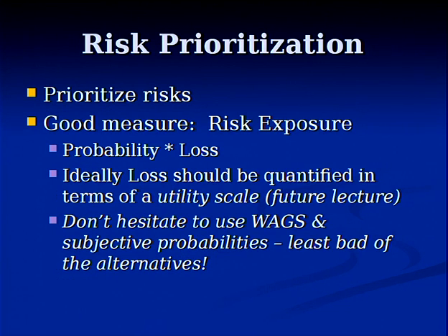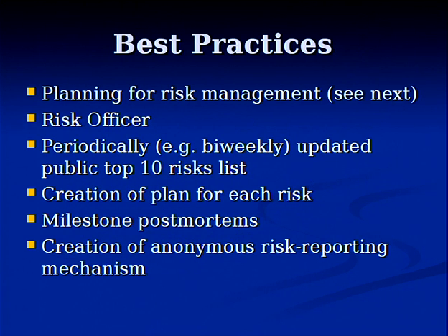Risk exposure we quantify as probability times loss. The idea here is not to have perfection. The idea is to have a rough measure of risk. Probability is something you guesstimate. Maybe it's off, but it's better than not talking about the risk at all, and it's good for reasoning roughly about it. And then the loss, the degree of loss. This is what we call risk exposure: probability times loss, the expected loss from this risk. If this is reasonably high for a risk, either because the probability or the loss is high, you probably want to think about trying to manage it.